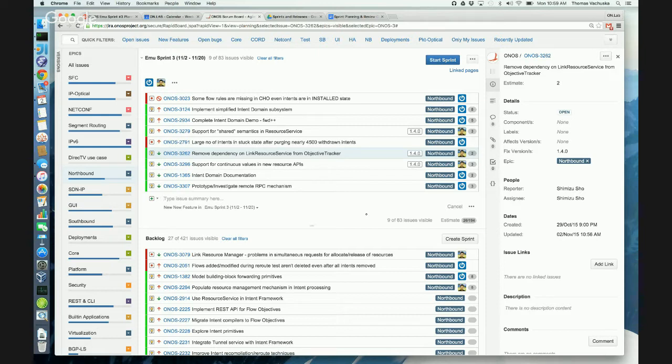But given the fact that some work has already been done, I think it's okay to overshoot. Not too bad. So we're talking about 11.5 points per person for 3 weeks. Yeah, that should be fine. Instead of 8, it's 50% more, plus the work that is not tracked. I'm also fine removing documentation tasks and some of the other lower priority stuff. I think the documentation tasks are the ones that should stay, as opposed to the implementation tasks. Documentation is more important.